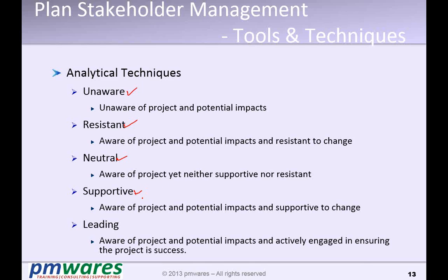Fourth is supportive, meaning the stakeholder is aware, he knows what is happening, and whatever you are doing, he is supporting it. And the fifth is leading: forget about supporting, he is taking charge of the situation and pushing towards the objective of the project, ensuring that the project succeeds. Many times you might have seen on the client side, the people drive things because for them it is very important. Now, a situation may arise where there is a neutral person and you want him to be supportive.